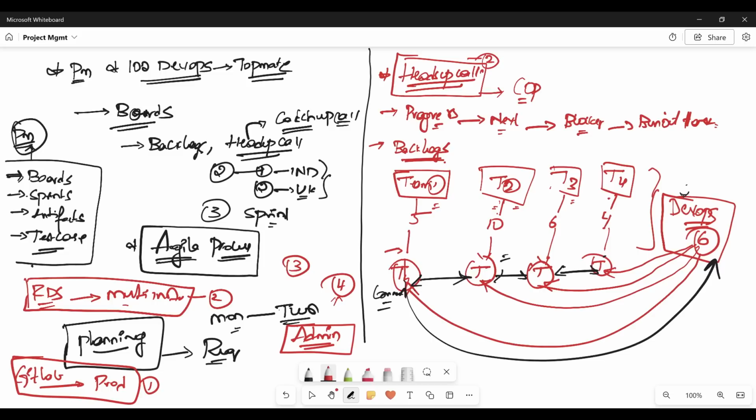Instead, we are the middle persons for everyone. During this call itself, we ask whether this activity is a priority or not. If it is a priority, how many days are they expecting? If they are asking within the next 4 to 5 days, or within one day, then we will push this to the current sprint.